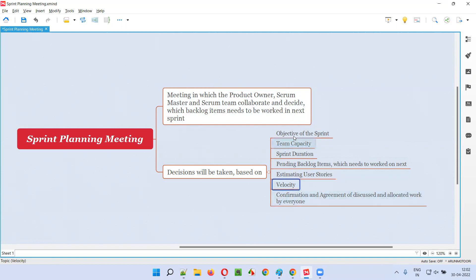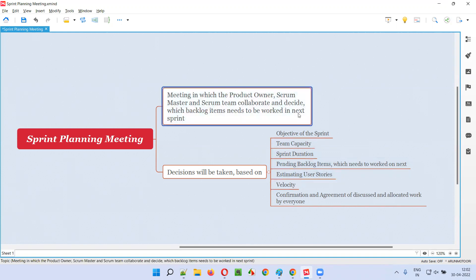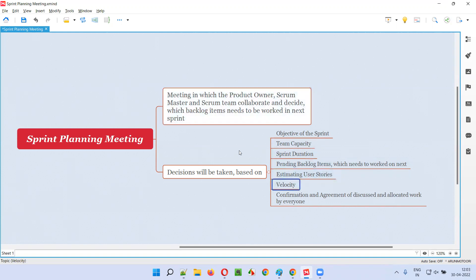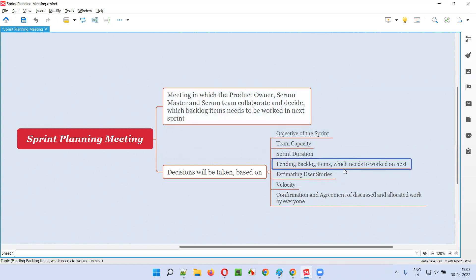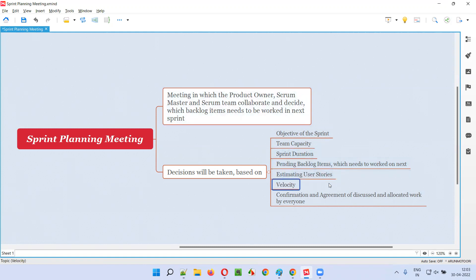Another factor is velocity - the speed at which the team is working. They calculate velocity based on previous sprints, getting an idea of how much speed the team maintains. Based on velocity, they assign work to the sprint without overburdening the team. Considering team capacity, sprint duration, pending work, and the objective of the sprint, they decide what work needs to be assigned and how much work has to be done by the end of the sprint.